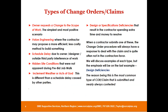The types of change orders and claims that typically arise: number one, the owner wants to change the scope of work — the simplest and most positive scenario. Two, value engineering, where the contractor proposes a more efficient and usually less costly method to build something. Three, a schedule delay due to owner, designer, or outside third party interfering with progress. Four, hidden site conditions not apparent during the pre-bid job walk. Five, inclement weather or acts of God. And six, design or specification deficiencies that result in extra time and money to resolve.